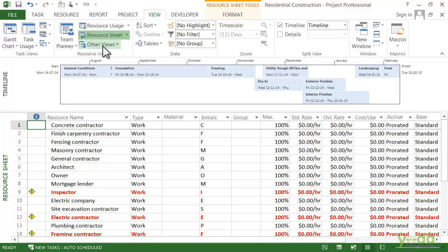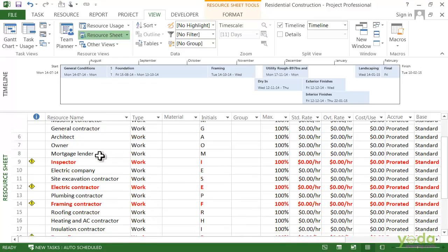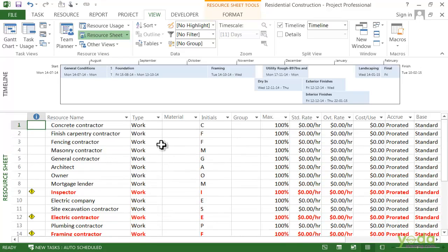The first type of resource is the work resource, and those are the resources you assign by time. So for example, the people who you assign by the hour or the day, and equipment like the dumpster that maybe you rent for a day or a week. How much time resources have available and their work schedules will determine how long the tasks take. In addition, their cost will affect the labor cost for your project.